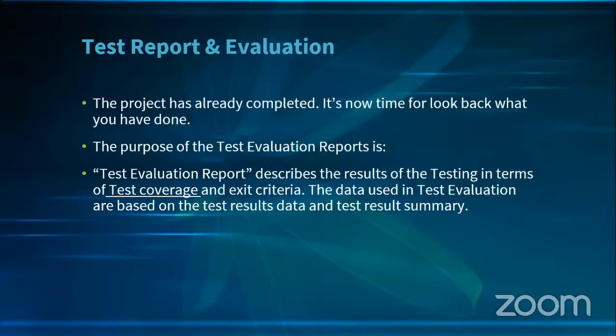It lets everybody know that on the 22nd of January, at the end of day, it could be at 5, it could be at 4:30, you send out the report to everybody. This is what we have achieved today. Is it green? Is it amber? Is it red? Red means maybe you couldn't go further. You are exceeding the deadline. But if it's still green, your things are going as expected. If not, if they are shaky, you have a lot of 7s and 2s, you could put it in amber.